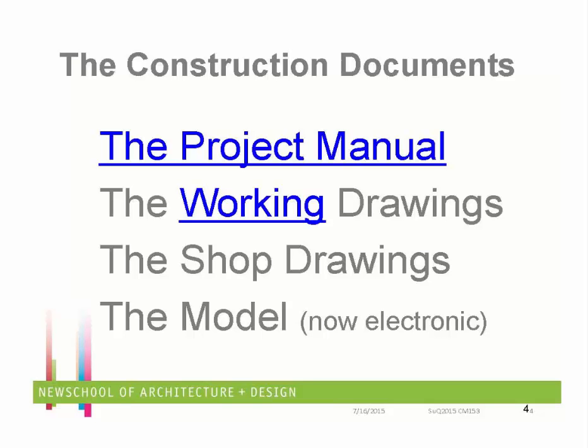So you're going to have to hire somebody to do a set of drawings that shows where all of the stuff is, so that the labor you hire to put the stuff in the field knows exactly where it goes. And then the guys in the shop who are taking those rebars and putting the bends and hooks in them and labeling them so that everybody knows that that's a 1R73 bend, and there's 10 of them I need for the floor, and they go here, here, and here. All of that stuff has to be put into the shop drawings.